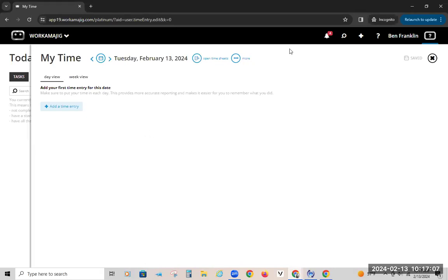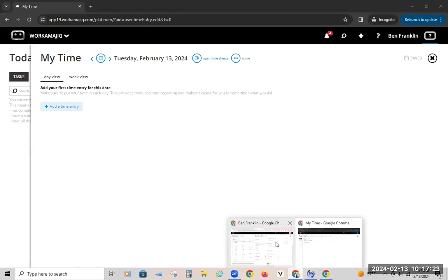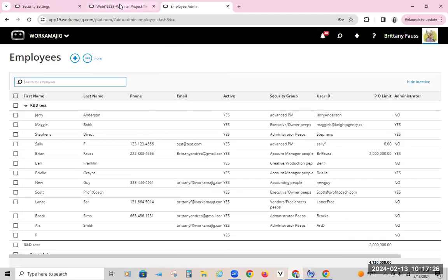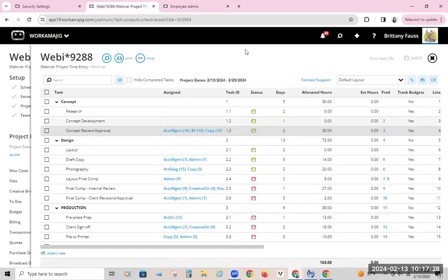Okay, so we'll go ahead and move on. Again, I locked down the employee's ability to just put time to everything. It's basically going to rely on me making sure that I go in and assign Ben to tasks. So I'm going to jump back into here. I have this project that I created and I specifically wanted to use just for this particular call. You'll notice I did assign him, but my project status does not allow time entries. It's not in an active status. So that's why we're not seeing it for Ben.